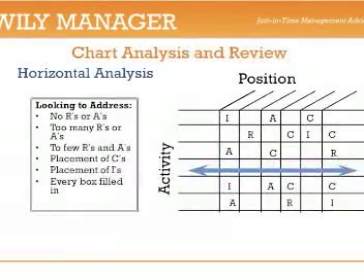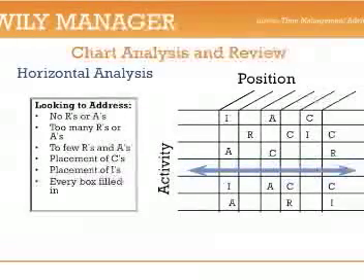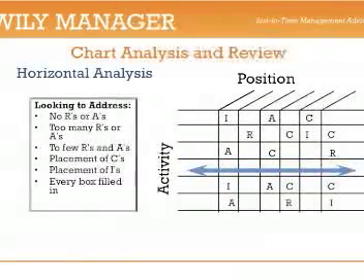So you've got the whole thing filled out. What do you do with it then? Well, the first thing you do is you take a look at it and you look across horizontally and you say, wow, that's interesting. For this process step, nobody's accountable. Uh-oh. Yeah, that could be a problem. Or you have 3 or 4 people that think they're accountable, right? So either way, it creates good discussion.